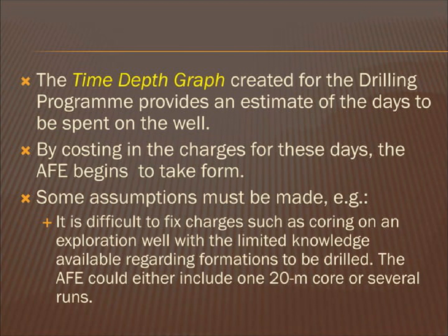However, some assumptions must be made when forecasting costs. For example, when dealing with exploration wells, it is difficult to predict exact expenses such as coring when limited information about the formation is available. The AFE can include either one long core or multiple runs.